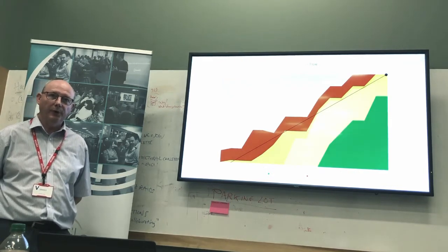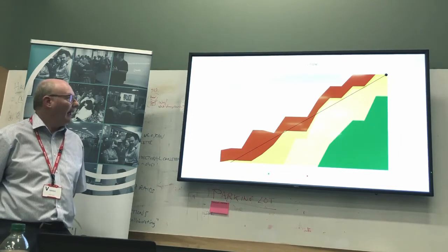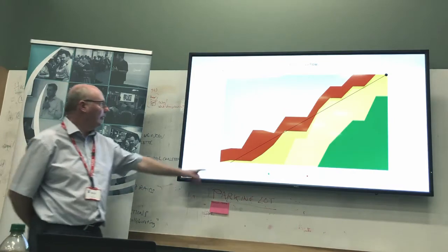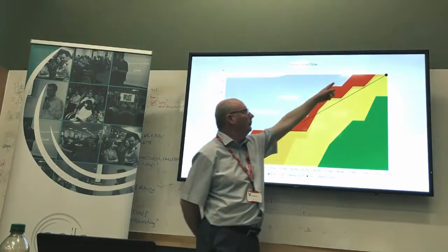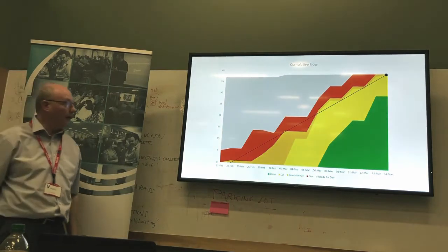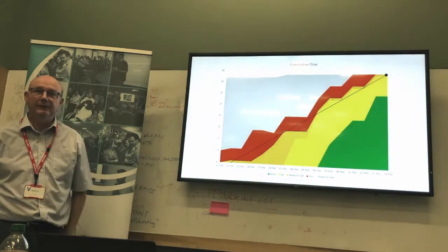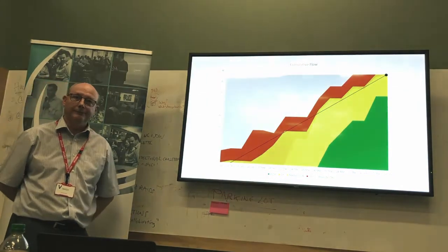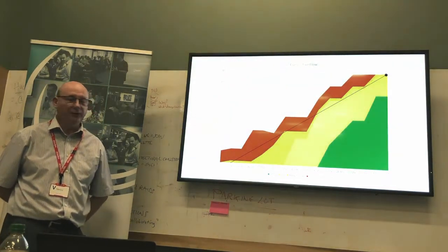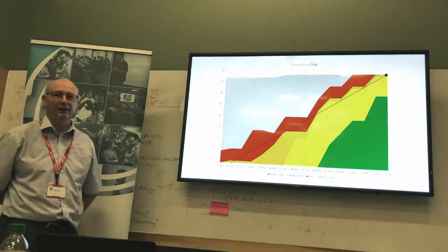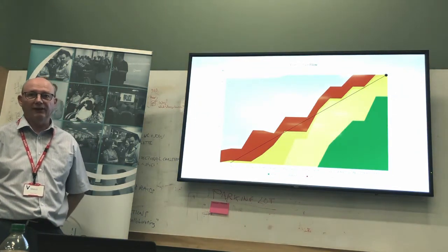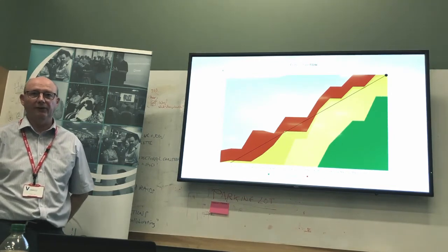Okay, that's a good spot actually. At the time that this particular team did this, I can point you at big stories, bump, bump, bump, but yes, that is pretty much what was going on. The regression pack was 4 days and it was manual. They had automated testing, but they were still doing, for every release candidate, a manual regression of 4 days of work with 2 testers.